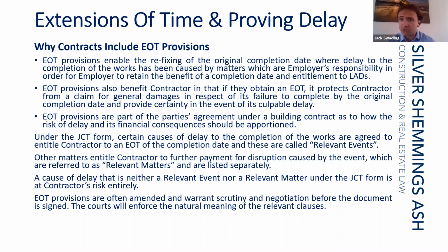In certain instances, it might be the contractor's view that the employer is looking to push more of the risk onto the contractor for things that perhaps should be neutral events, so events that entitle additional time but not additional money. This is why amendments to the extension of time provisions are important.